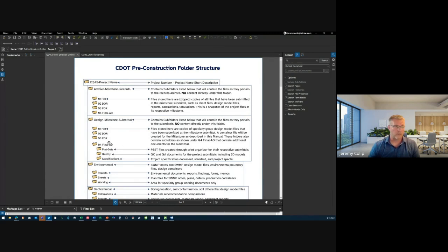They would fall under the respective submittals. So you would have plot sets under each one of these. Quality, same thing, you would have under each one of these, because we want to make sure that CDOT, consultants, municipalities, whoever is working on these things, when you all provide a submittal, you have a place for those documentations. You have a one-stop shop where you can go, hey, these are my documentations for this. These are all my quality checks. Here are the P sets that I used, because I have a different index based on those.